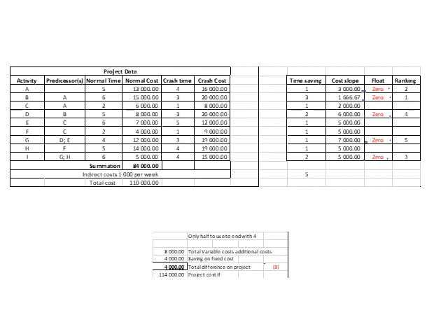Okay, so what we've got here is all of this data on this side is given, normal time on this side, and the time saving is also given or calculated here. So for item A, we can save 1 week if we use our normal time, we subtract our crash time, so we can see, okay, we can save 1 week on this item.